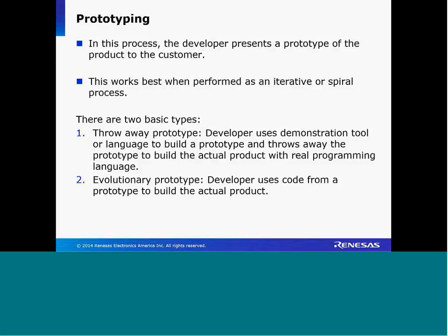Peer review is always a valuable way of verifying whether something is right or not. When I worked for Ericsson and Sony, we were developing phones, and we did what we call multiple turns of the hardware board, adding more software as we went along. So we used an iterative, spiral type of process. We would develop what we thought was all the hardware, and we would find different types of problems. For example, oh my gosh, we discovered that our processor wasn't working fast enough. So we switched out the processor and put in one from the same family but with a higher frequency clock, which meant we had to change the oscillator as well, and then we also had to do validation and simulation with the clocks.